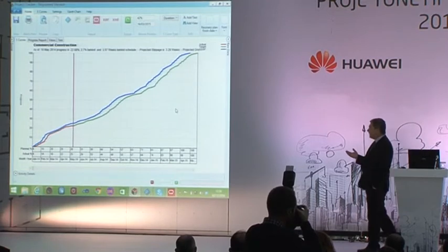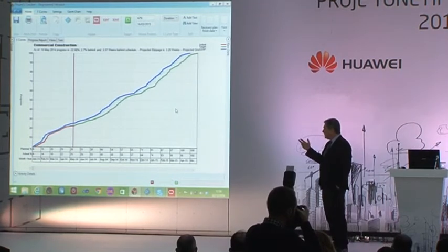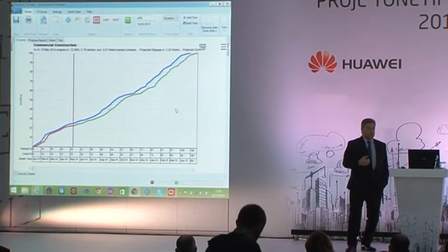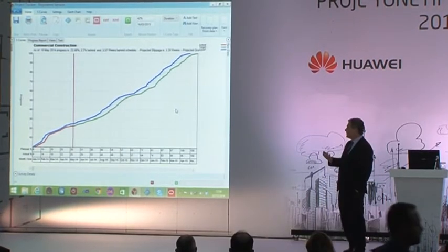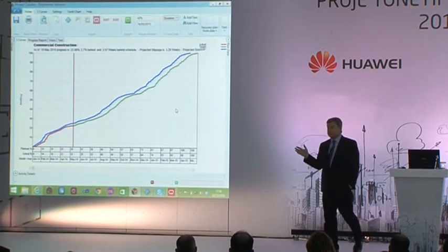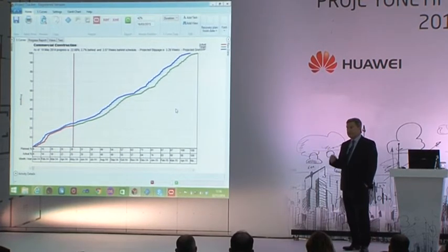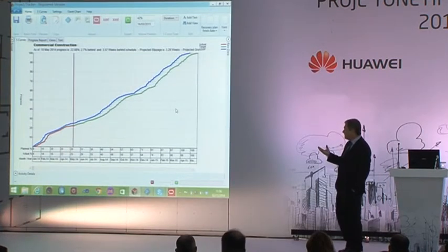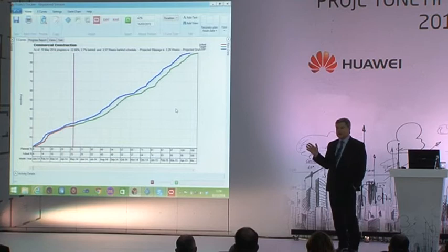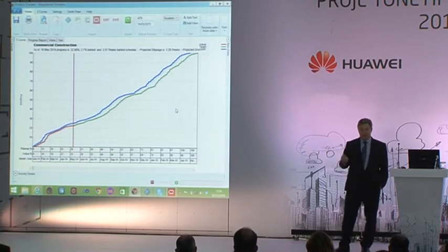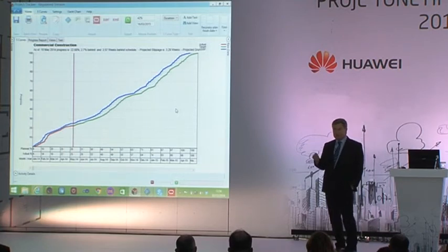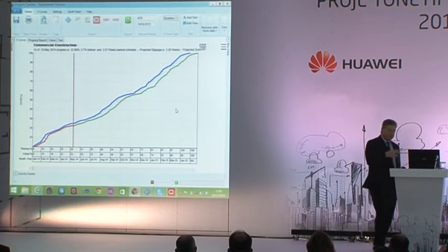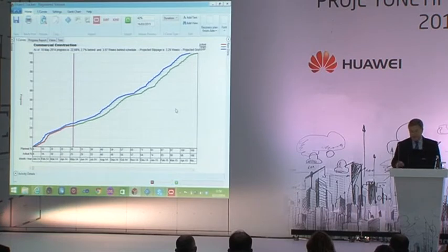So it imports it very quickly, and it's created for me some curves. Yep, so I haven't had to create a dummy resource, a dummy cost. It doesn't even have to be a cost-loaded schedule. I've got S-curve really quickly. So if you've worked with earned value analysis before, this might resonate with you. You might understand this. But a lot of clients these days are asking for S-curves. A lot of people want it as part of their reporting pack, if you like, when it comes to progress. So if I just take you through what we're seeing there.